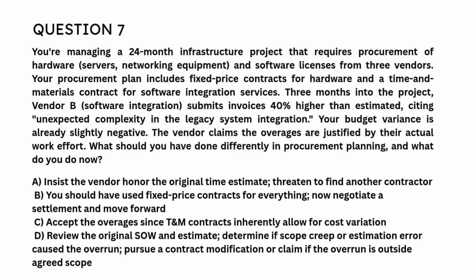Correct answer is D. Review the original SOW and estimate. Determine if scope creep or estimation error caused the overrun. Pursue a contract modification or claim if the overrun is outside agreed scope.